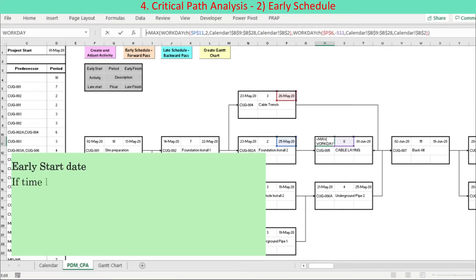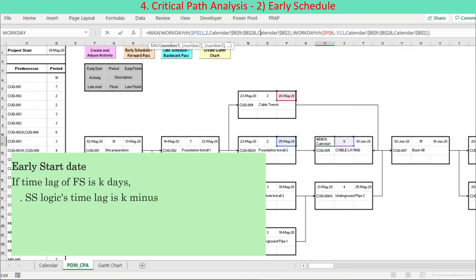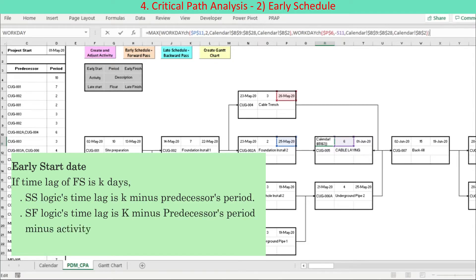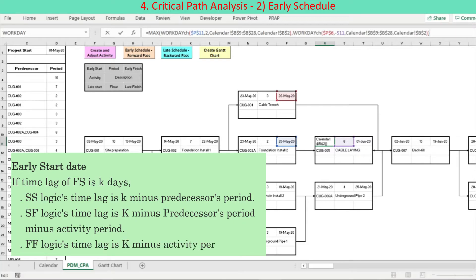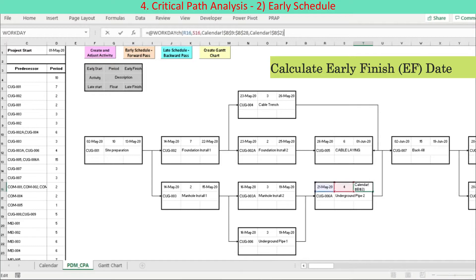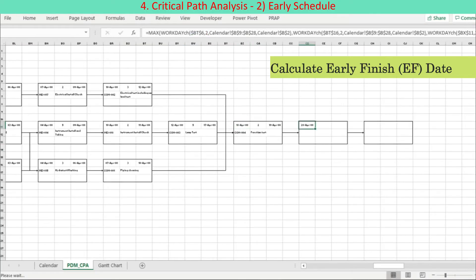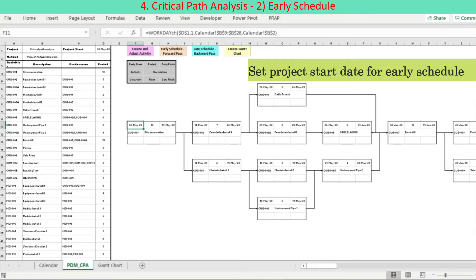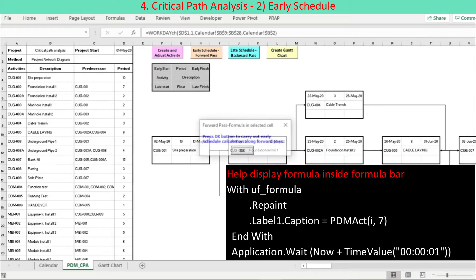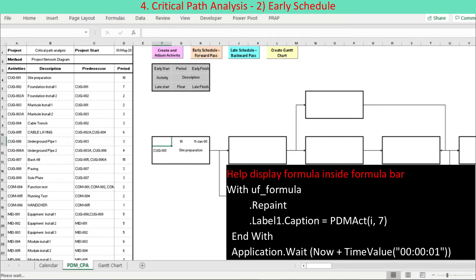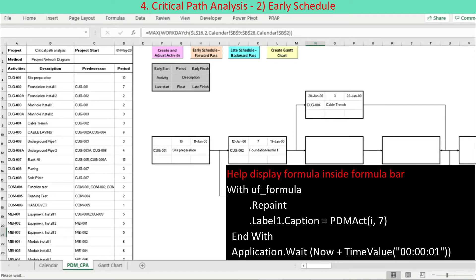Activity time lag of other logics is made equivalent to that of FS logic for incorporation into start date formulas. If time lag of FS is K days: SS logic's time lag is K minus predecessor's period; SF logic's time lag is K minus predecessor's period minus activity period; FF logic's time lag is K minus activity period. Activity finish date is calculated by adding period to the activity start date. Project start date is entered for the start activity, programmed to take place as the last act of the forward pass operation. To view development of schedule formulas in sequence inside the formula bar, we use the user form repaint method along with the application wait method.